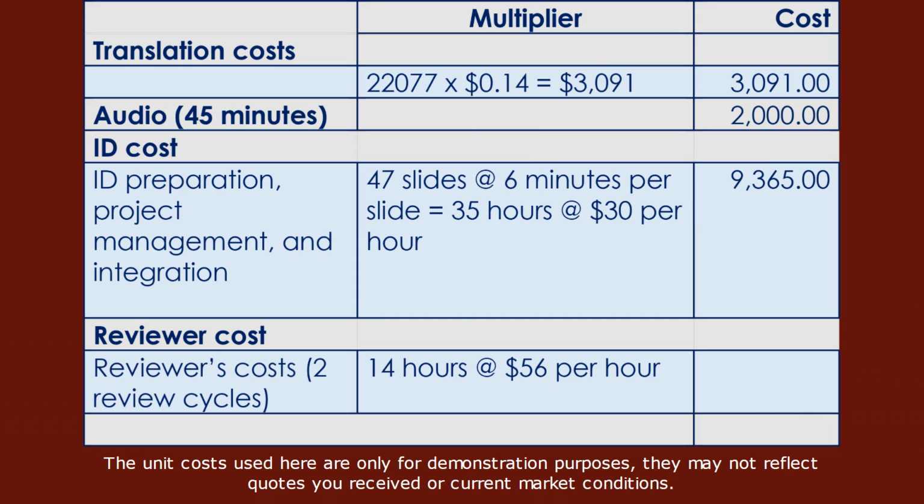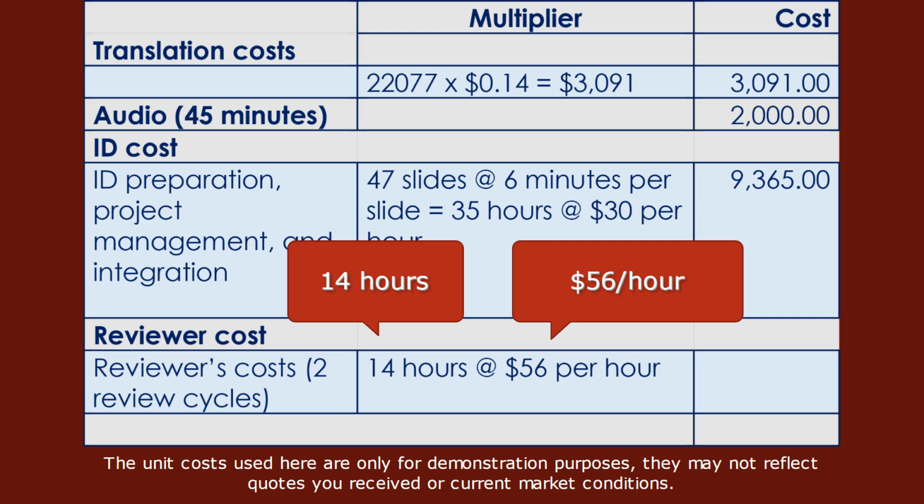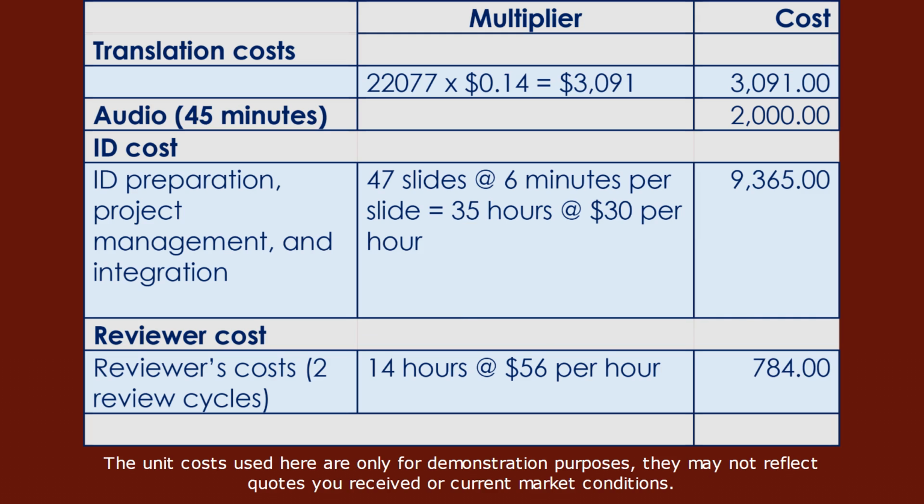In a properly run translation process, you should have the material reviewed by a native language speaker. The reviewer estimated 14 hours at a rate of $56 per hour. For this project, the reviewer adds another $784.